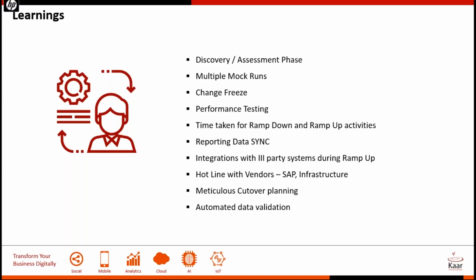I think it depends on every customer. So depending on the complexity, depending on the size of the database, and depending on the complexity in terms of the number of company codes, the number of entities. So the more mock runs you run, the more comfortable the project team is to touch the production.